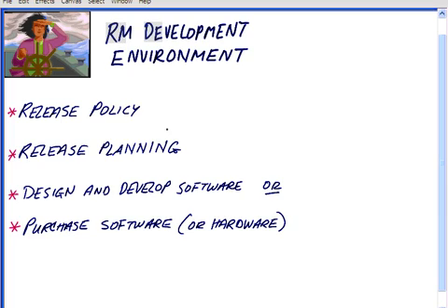You'll also determine during the release planning process what level the configuration items can be independently distributed of each other, these release units. Do they need to be released as a package, or can they be released independently? You have to evaluate during the planning, design, and development the potential impact of the release: how many person hours it's going to take, the life cycle of the process, how difficult the installation on the production side will be, and the impact on the end user. Also the complexity of dependencies between software and other software, software and hardware, and the overall IT infrastructure.